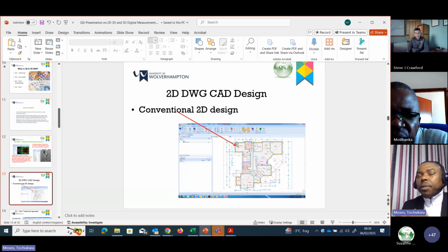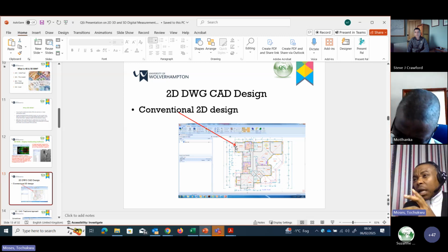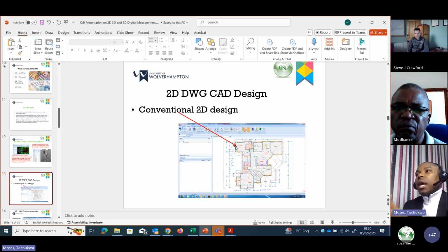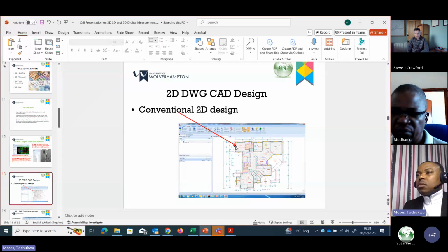And of course, definitely PDF will not. So you have to reorientate it. You just have to reset and then recalibrate. That's the feature to use for calibration within the software. You recalibrate the design to the scale it was initially designed to. For example, if you have 4,500 millimeters and you measure that without recalibrating, it might give you something like 10,000 millimeters or whatever, which is not possible within this particular length. So you need to recalibrate.